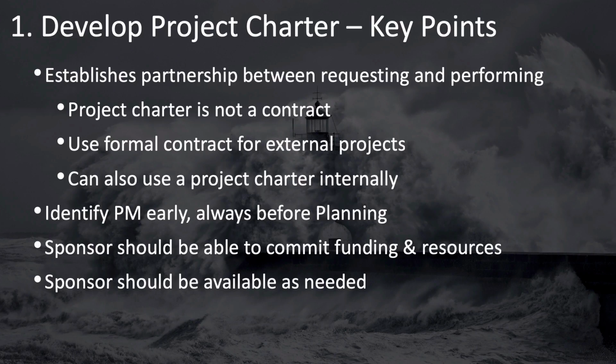The project charter is your key document for making sure you keep all of your stakeholders on the same page throughout the project. And as the priorities and objectives of the project can change slightly over the life of the project, it's important to keep the project charter up to date. That way, as people come and go on the project, they can be brought up to speed quickly on what the high-level goals of the project are.